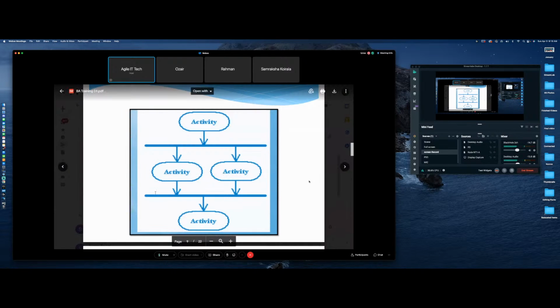And then you have another synchronization bar on the bottom that is going to activity number 4. So basically, you have activity 1 that gets split into 2. So this synchronization bar is what we call a forking bar, right? One activity is getting split into 2 activities. And both those activities 2 and 3 are running in parallel. So both must complete, meaning activity number 2 and activity number 3 must complete for you to go to activity number 4. And the transitional bar here, this is the joining because you're joining 2 activities into one. So the top one is a forking, bottom one is a joining. Okay, any questions here?